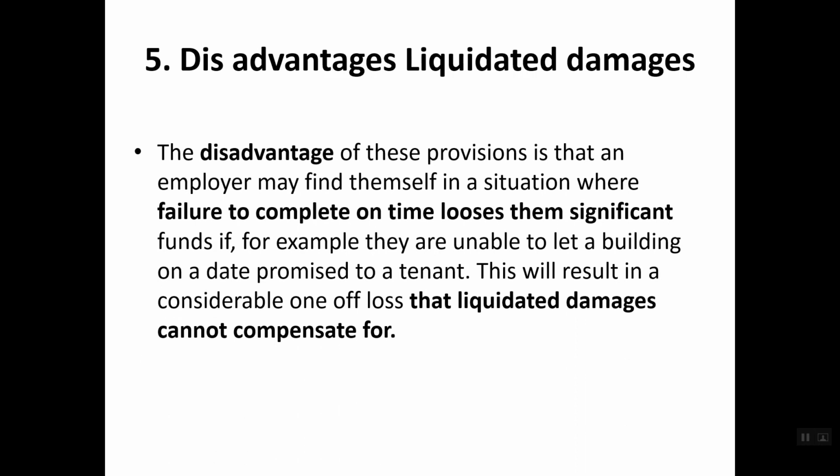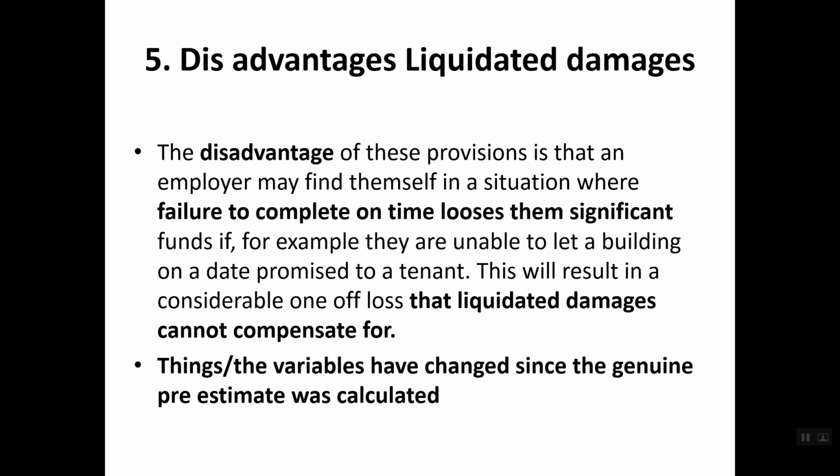The disadvantage is that sometimes the employer could not predict at the initial stage, and then that amount will not be sufficient to cover his loss. So that will be a kind of disadvantage. But you, as an employer, should know what your loss will be if this thing is going to be delayed.